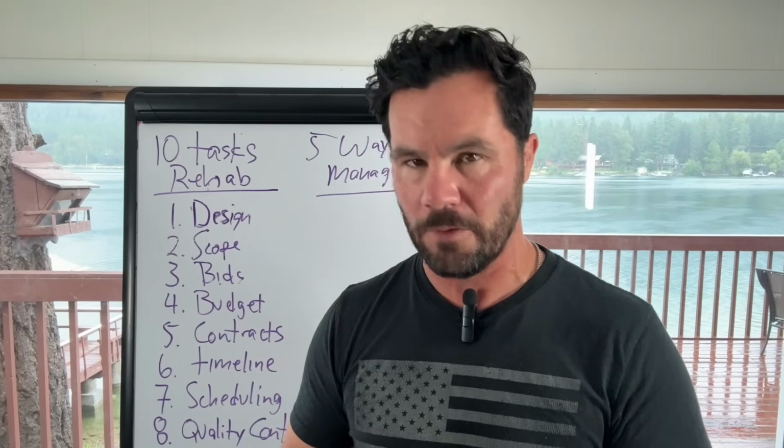You should find a cluster of pricing that's going to give you a really good idea of where you should be at. You don't just take the highest bid. You don't just take the lowest bid. You want to find where the right price is for the market.